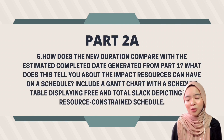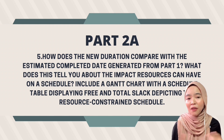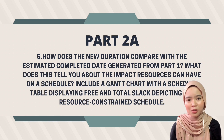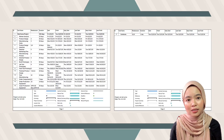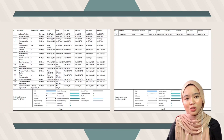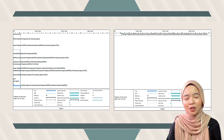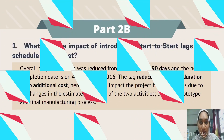The revised deadline pushes completion by two months and lengthens the plan by 50 work days. In order to finish the project on time, each phase must be completed with the appropriate resources; if they are not correctly allocated at the beginning, significant delays will occur. Figures attached illustrate the project Gantt chart with schedule timetable displaying free and total slack depicting the resource-constraint results.